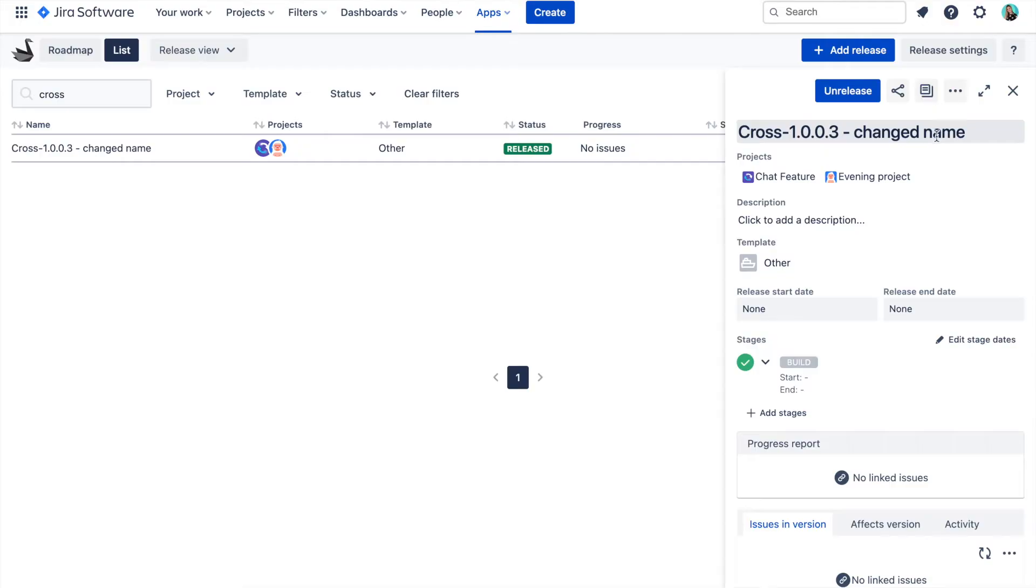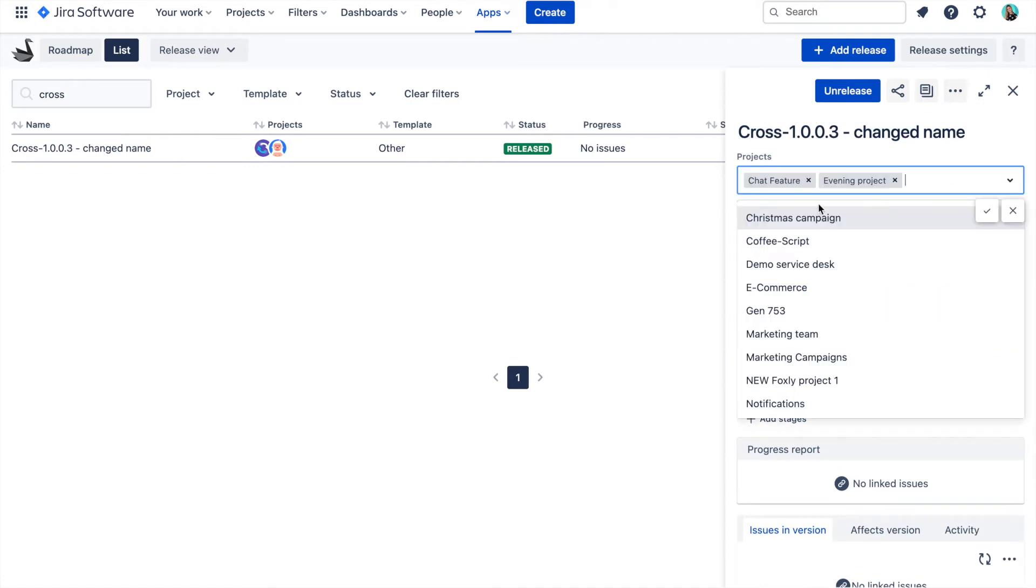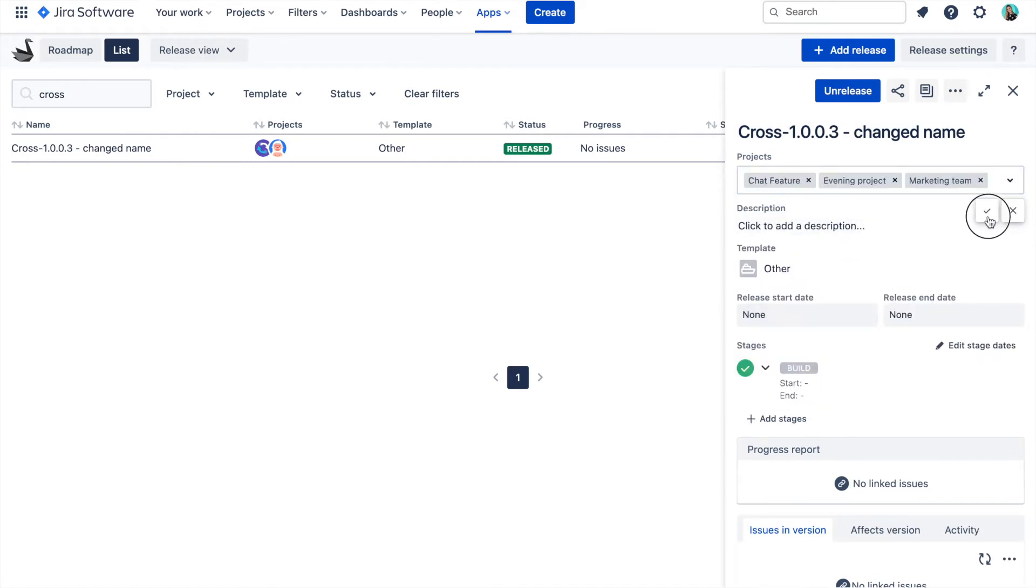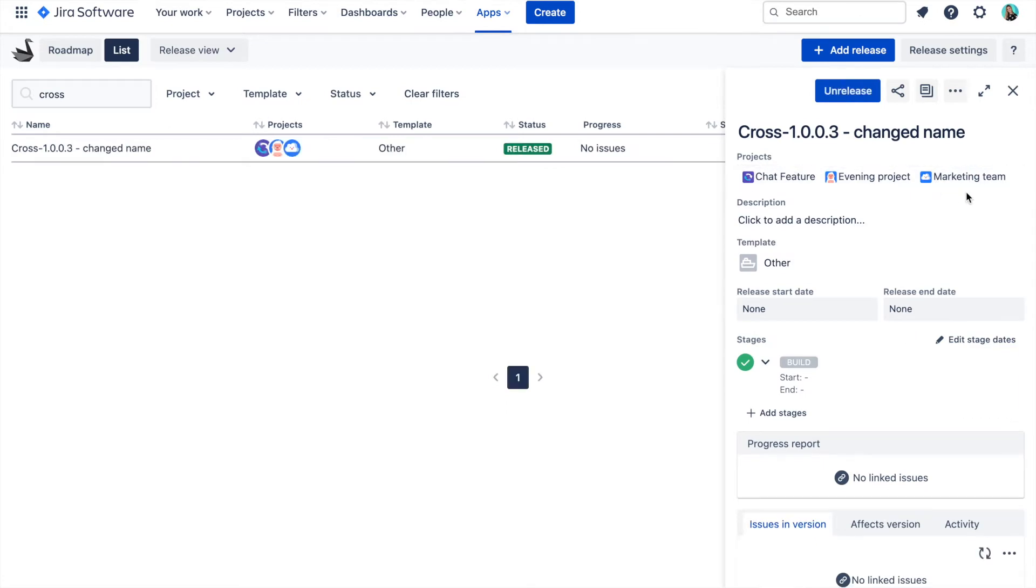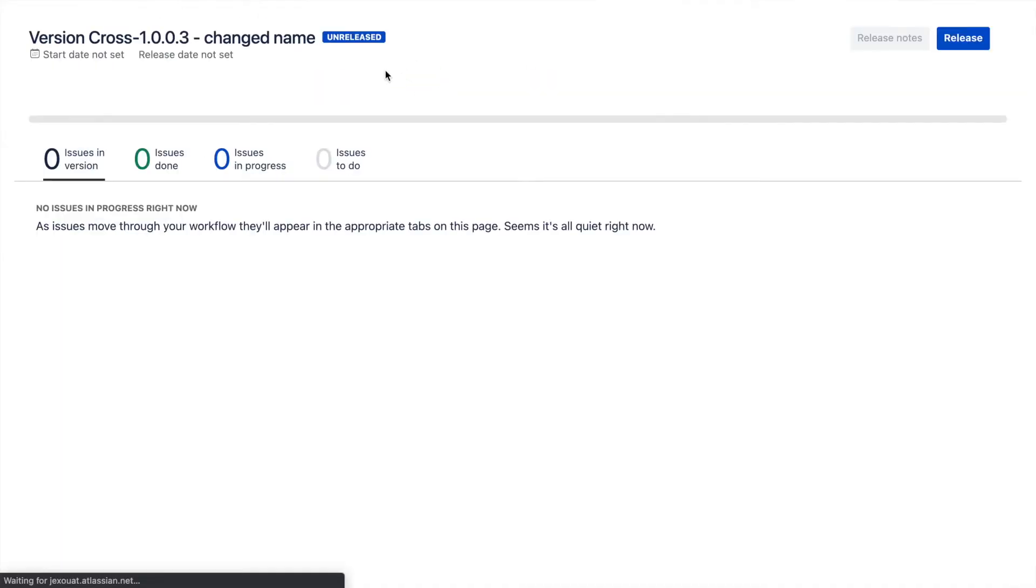Also, if you would like to add more projects to the cross-project release, you can simply do that from the release detail report in Swanly. Just click here on the projects field and select the extra project and click outside to save. A new Jira version is then created in the project and you can start using it.